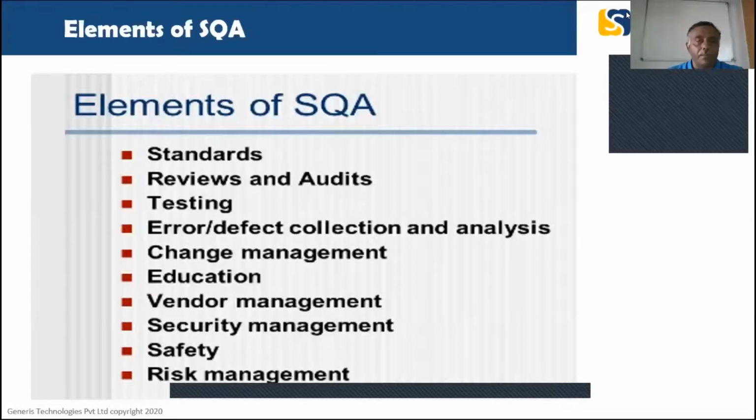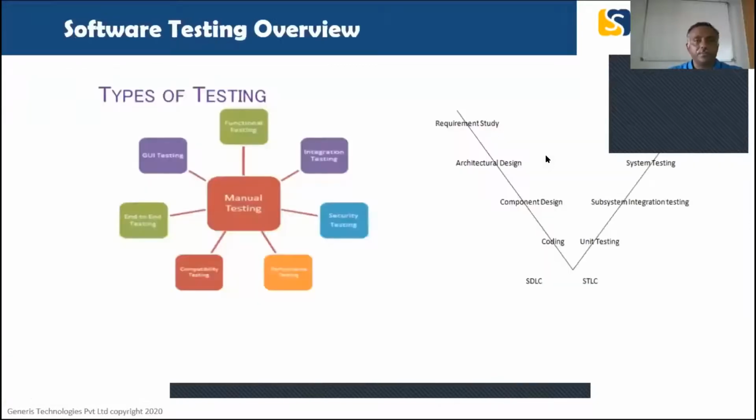All these things will be handled in risk management, and all these plan formats are for you, so that they can understand how much effort is going into this kind of activity. We spend around 35% of the effort basically on the quality side of it.